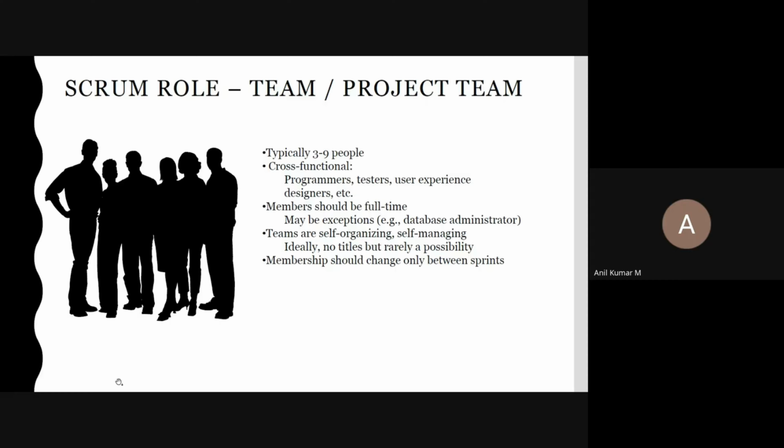Who will be there in the scrum team? UI designers, developers, testing team, database team. Okay, so teams are self-organizing, self-managing, ideally no titles. There are no seniors, there are no juniors in this one. Membership should change only between the sprints.